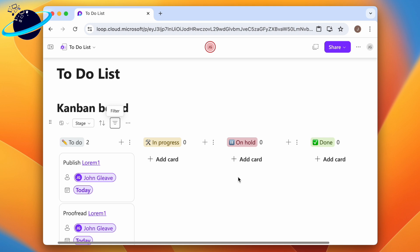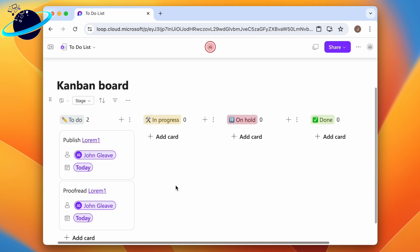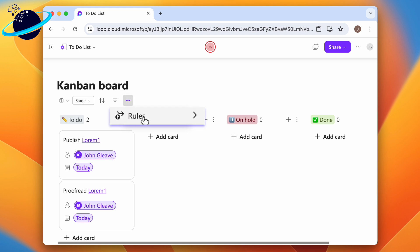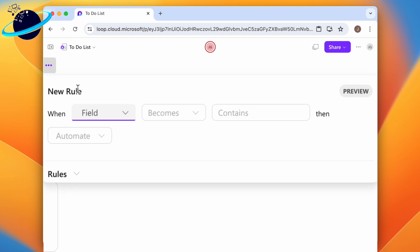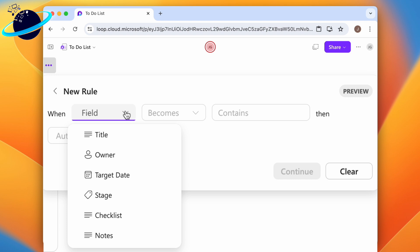If you want to get notified whenever a task changes, you can set up an automation rule. To do that, click the three dots at the top, then click rules. Select a field that you want to check for changes. To trigger the rule whenever a task gets completed, choose stage.